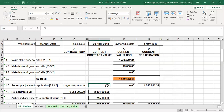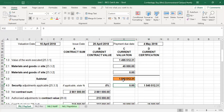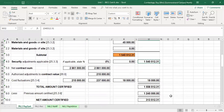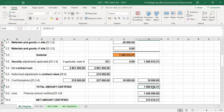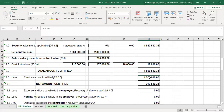Note that in this case a construction variable guarantee was selected. With a variable construction guarantee, the retention is zero — meaning whatever we certify, the contractor will receive 100%. We then add escalation, which amounts to 18,000 rand — 14,000 for the main contractor and 4,000 for the nominated subcontractor. That gives a subtotal net certified for this month of 1.558 million. Less the previous certificate amount of 1.245 million — certificate 5 was given — means the net amount certified for certificate 6 is 313,000 rand.